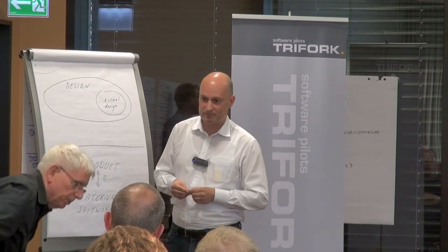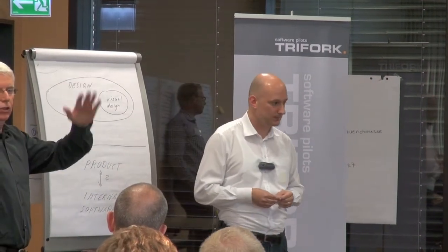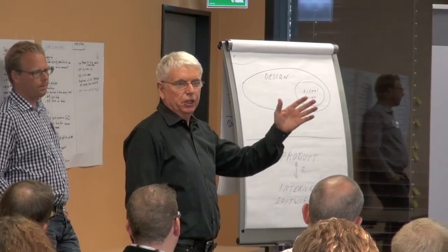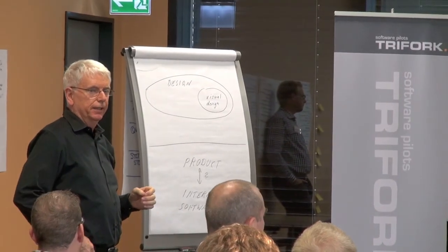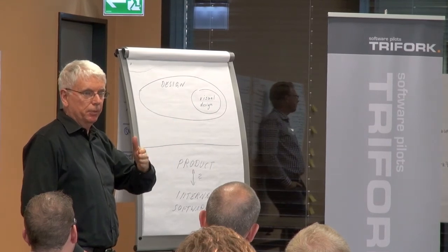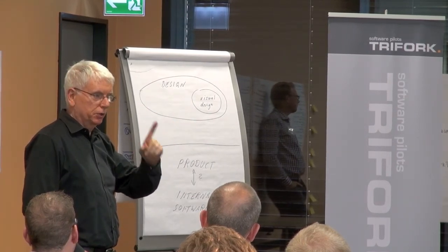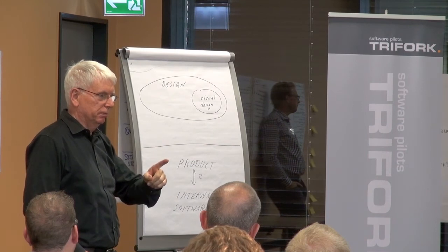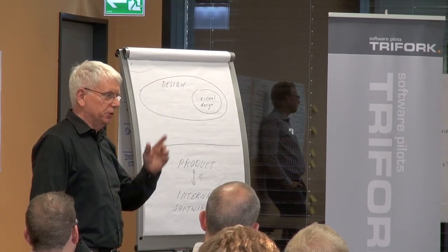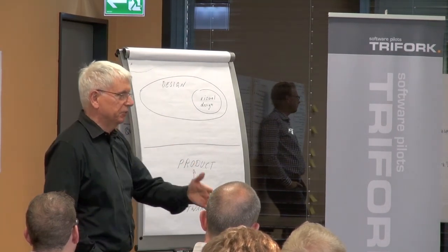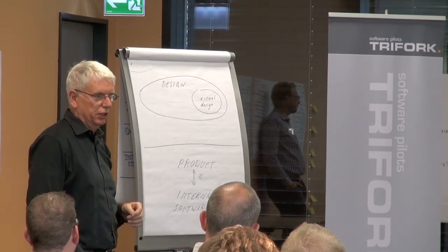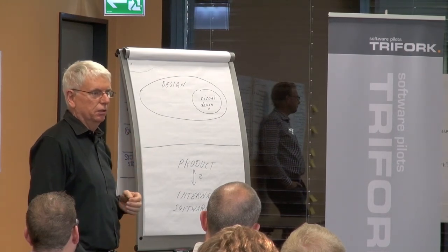One thing that really helped at PatientKeeper focus us: we had more backlog than we could implement for 10 years. So we had no shortage of backlog. When the product owner came up with a new product, we weren't interested in starting on that until, in fact, the CEO made it a requirement. There had to be 4 signed contracts with customers before we would cut a line of code. And we knew we could deliver anything in 3 months, which was the time it took a hospital to sign a contract, get the install, and come live. So it made no sense for us to cut a line of code until the deal was done.